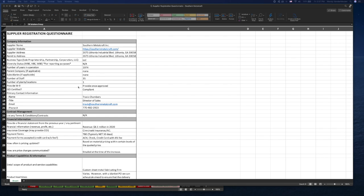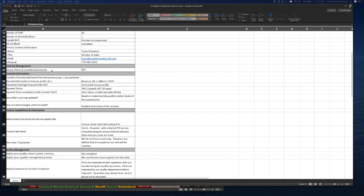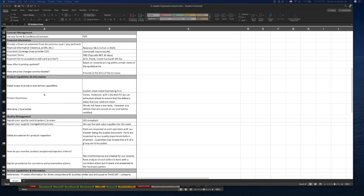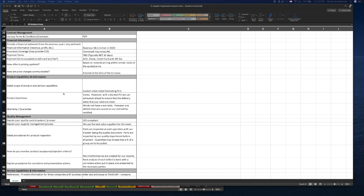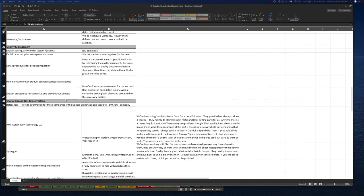I have gathered information across a number of topics. This is an example of one I did for Southern Meadowcraft, and it includes general company information, legal terms and conditions, financial information and insurance, product capabilities, quality control, and references.